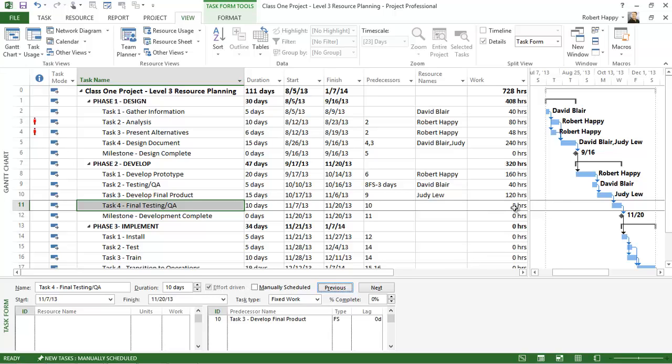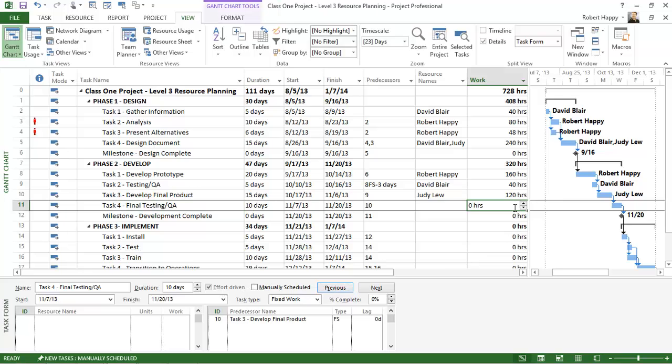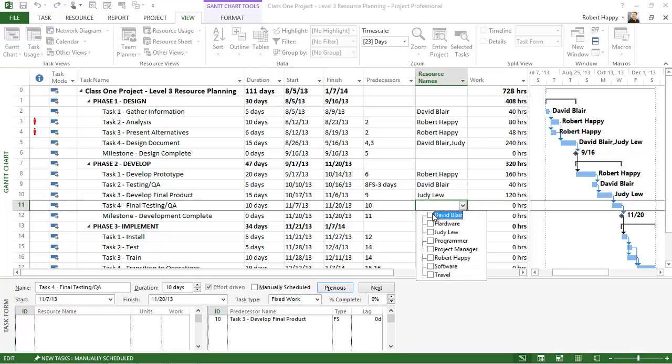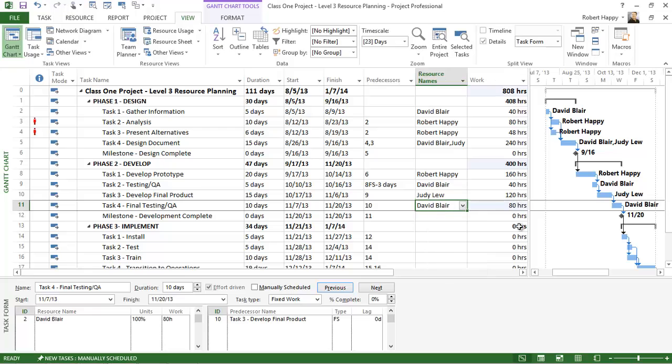So I don't have any effort here. Now I could type in some effort to begin with, or I could simply type in a resource, say David, hit enter, and the effort gets calculated. Now the fixed component here is the 80 hours based on whatever goes into that work field initially.